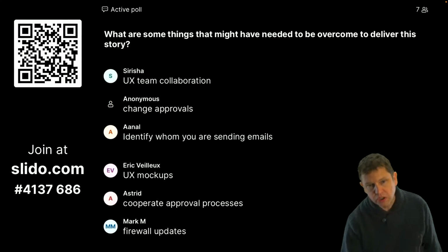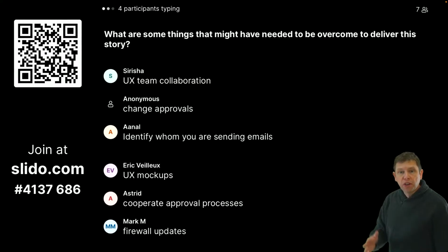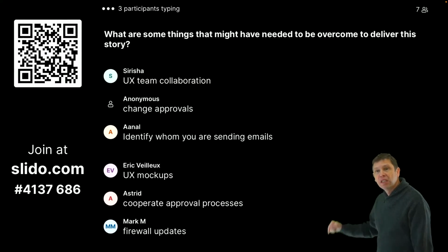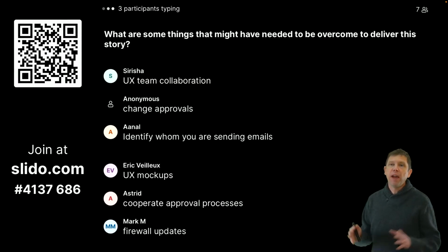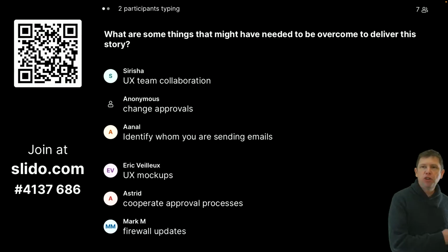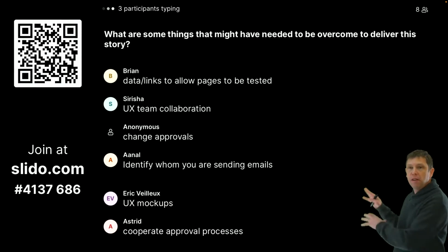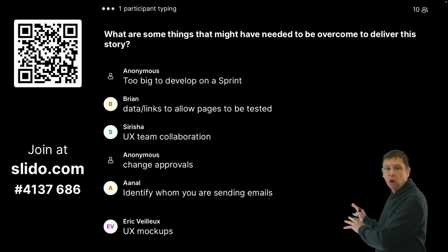But particularly for the early stories, there's all these things that can become barriers. And what we want to do is hit these barriers as soon as possible. Because if I grab something that's going to take me 2 weeks to develop, and I spend 2 weeks working on it, and then I start hitting these barriers, I want to bring those forward, right? I want to bring those so I know what these things are early on.